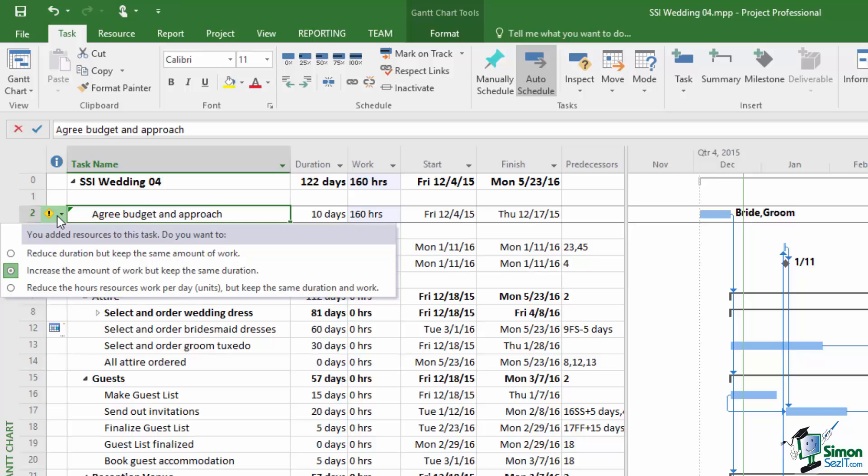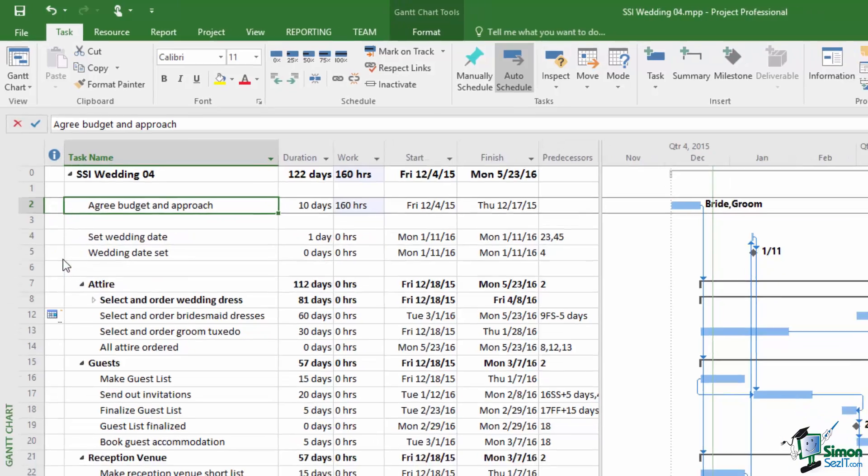We're not going to say that because the bride and groom are working on it it's only going to take half the time. We decided it was a ten day task and that was it. We don't make it a five day task because two people are working on it. That set of arguments about work and duration and the amount of work in a task and so on is what we're going to look at in the next section. And I hope that that section will explain to you why we get these options here and in fact which of these options is the right one to choose. But on this occasion we're going to go for the default option which is increase the amount of work but keep the same duration.